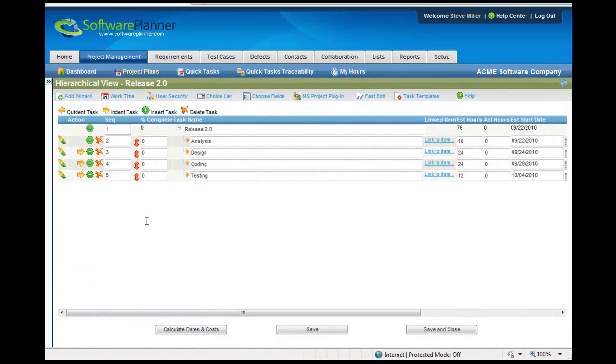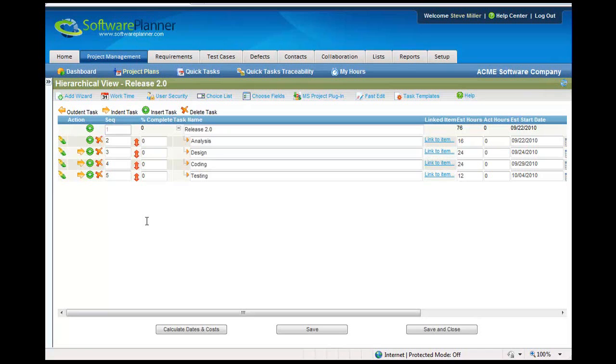So, that's how easy it is to import into Software Planner and export out. Now, it's important to note that these do not keep each other in sync. In other words, you couldn't export out of Software Planner into Microsoft Project, make a lot of changes, save your changes, and then re-import your changes back in. It's not really designed for that. It's designed for a clean export and import. Thank you.